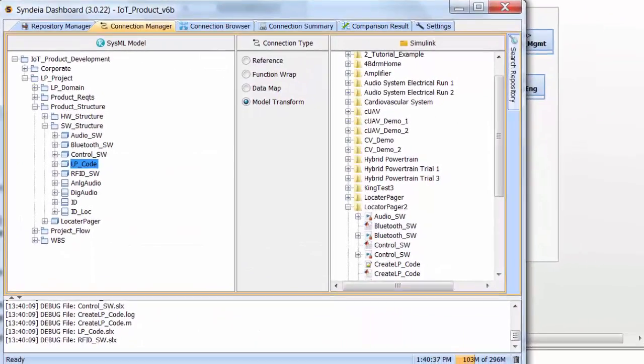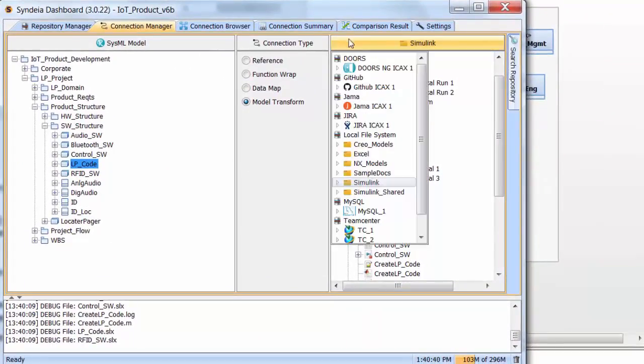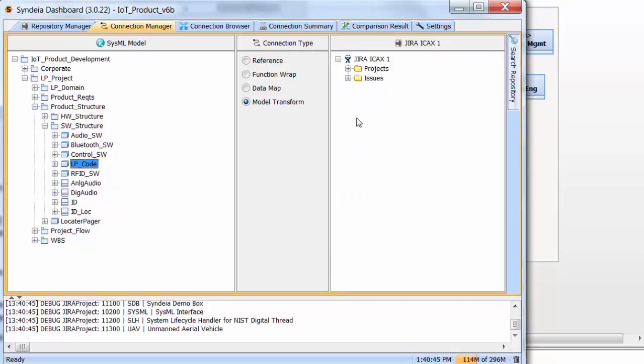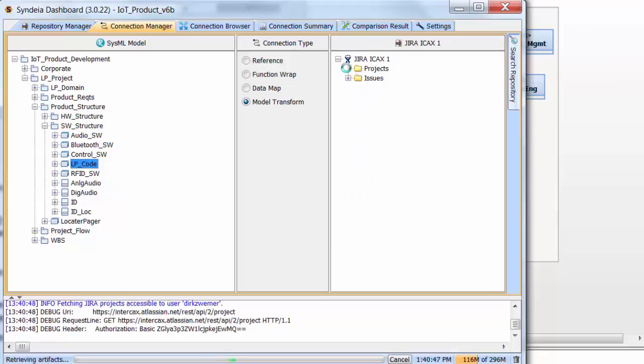In the same way, the Work Breakdown Structure hierarchy can be used to create a mirror structure of tasks in a Jira issue tracking repository for project management.